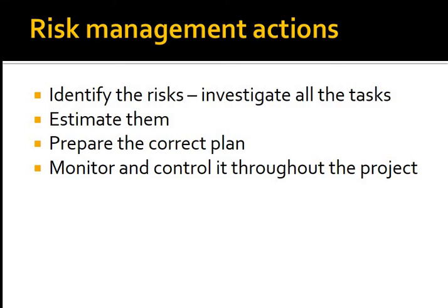If we want to deal with risk, first we need to identify all kind of risks that may come into play. Then we need to be able to estimate what kind of probability is connected with them and what impact they may have on our product, and we need to be able to include those calculations in our project plan and also to deal with them during the execution phase of our product.